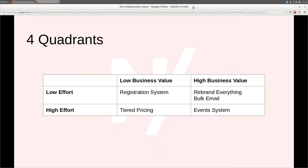A very basic way to start looking at your work — more of an organizational tool than a game — is dividing things into four categories: looking for those things that fall into high business value and low effort, because that's where you get maximum benefit. If you can do something in five hours that's going to give you eight points of business value, it definitely seems like the sort of thing to consider tackling.